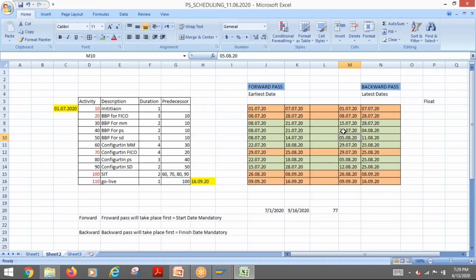That is why you will find differences between MS Project and SAP, and there are some other differences also. In most software other than SAP, you cannot keep plan date and actual date as different dates. Whenever you confirm, the actual date automatically becomes the plan date.